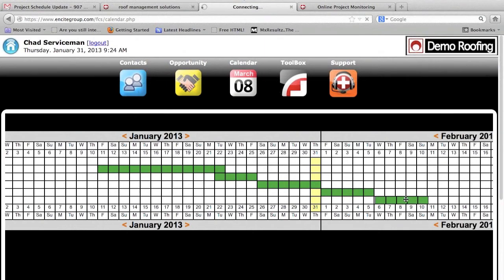This is going to refresh for me. And as this refreshes, it's automatically going to allow me to see those updated dates for when I change this. My client's going to know because my OPMs are going to send out and say, you know, your project is scheduled to load in 7 days, or whatever it might be, to keep them up to date. So it's always important to understand it's not necessary to send your OPMs out a month in advance. When you as a company bolt down your schedule to know 7 days in advance, or 14, or whatever it might be, my schedule's hard set, that's when your emails should start going out.